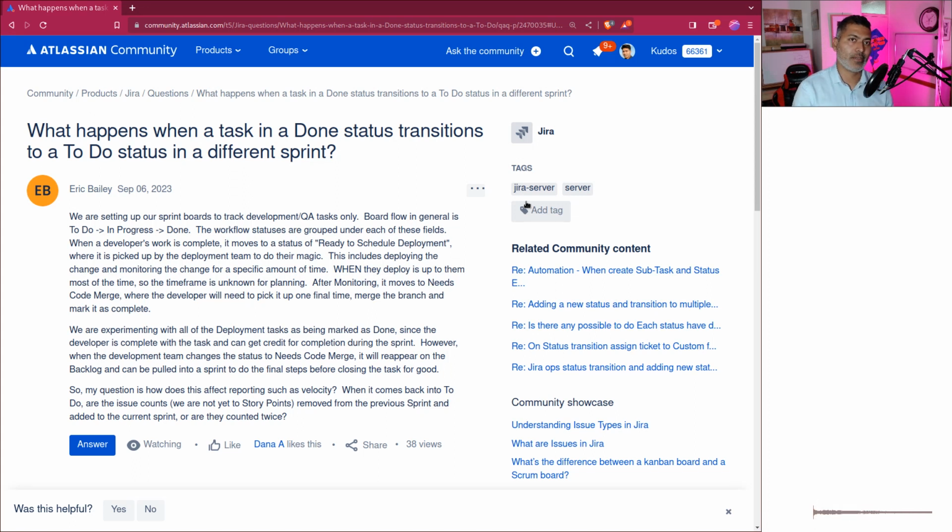It is perfectly okay. And if that is the case, ideally, and again it is not always possible for everyone, you should have 3 tasks. Task number 1 would be your dev task. Task number 2 would be your testing task. Task number 3 could be your deployment task.